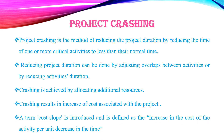A term 'cost slope' is introduced in the case of project crashing, which is defined as the increase in the cost of an activity per unit decrease in time.